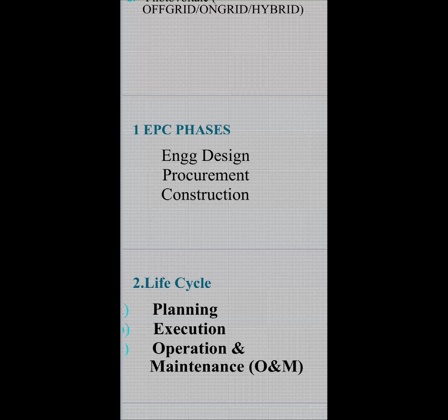Predominantly, we start with the civil activity, which is the first and foremost step. This may be related to ground leveling and piling, drilling, and erection of the foundations using various technologies. Once the MMS is installed, MMS stands for module mounting structure.